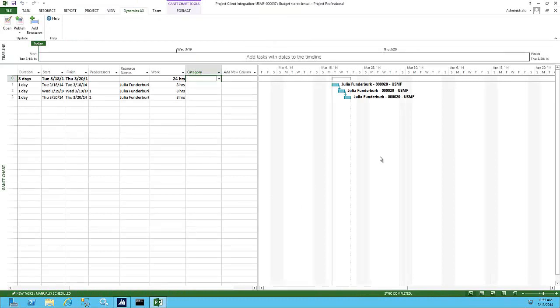This is demonstration 4 on how to replace the work breakdown structure from a project in Microsoft Project to a project in Microsoft Dynamics AX. If you are already managing a project in Microsoft Dynamics AX, you can add the work breakdown structure from a project in Microsoft Project to the project in Microsoft Dynamics AX. This action updates all aspects of the work breakdown structure, but does not change other elements of your project, such as the customer or the project contract.